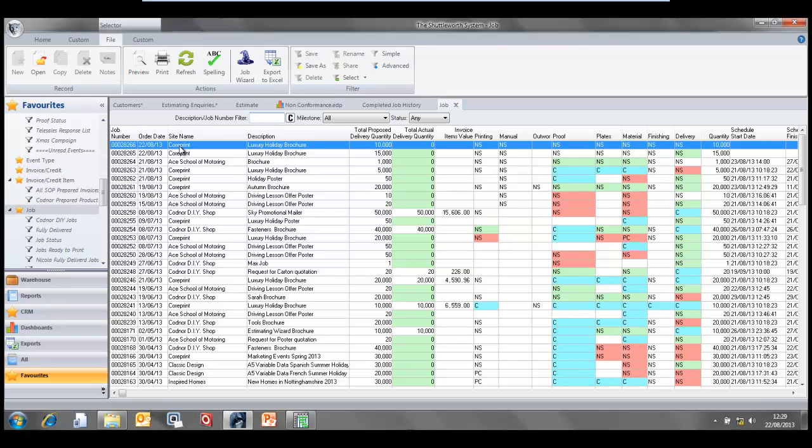The columns will show the milestone name together with the status and the background colours. Here we have green, which means the milestones are on time, blue for complete, and red for late, and no colour means that there are no dates to compare.